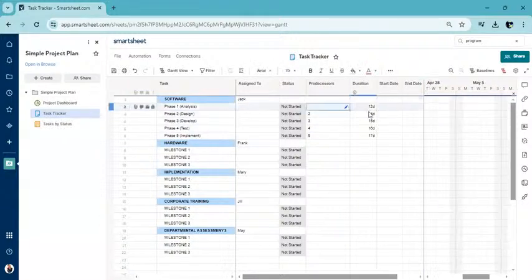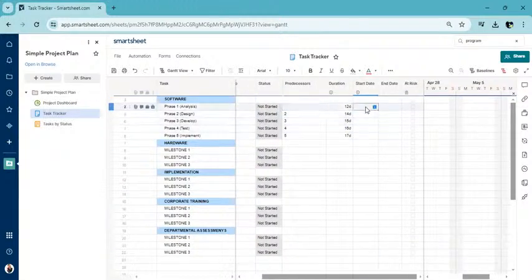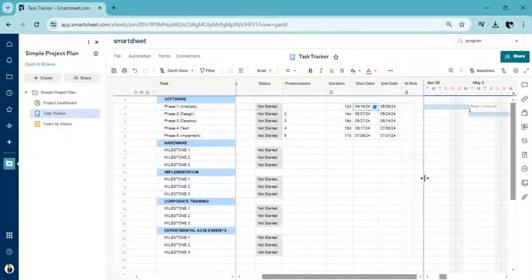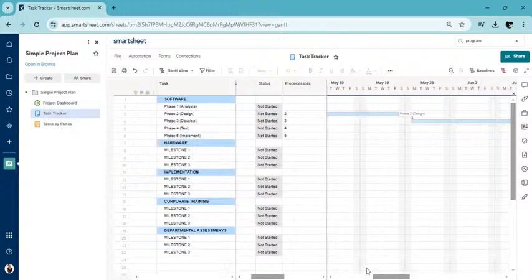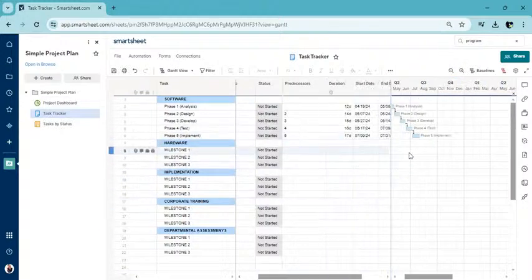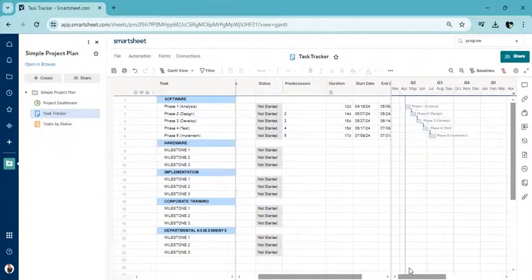So we put in the durations, we've not got the dates in, so we need to at least get the ball rolling with a start date. So let's put in today's date. And now we've got some linkages, as you can see. That's exactly what we're trying to do. We're trying to make sure everything is linked nicely. And because we are assuming they are linked in that cascading fashion, we can just go ahead and say phase 1, phase 2, whatever that might be called, phase 3.